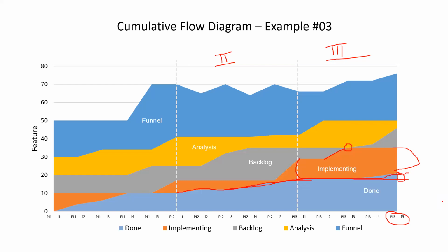Right. This is the graph for the Scrum team. That's the reason I1, I2, the iterations or sprints are there. This is not a typical Kanban chart or board. Now, if we have a WIP limit, that is where the line will be consistent at any point of time for that given phase or stage.